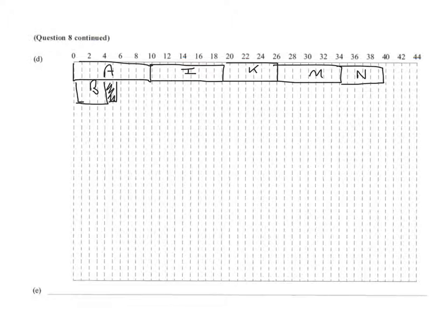Activity C starts after 10 days and finishes after 15 days. So I'm drawing 10 to 15, seems to be an ambulance going by. So it's 10 to 15 days, and there's an extra 4 days slack from 15 to 19, which is like this.